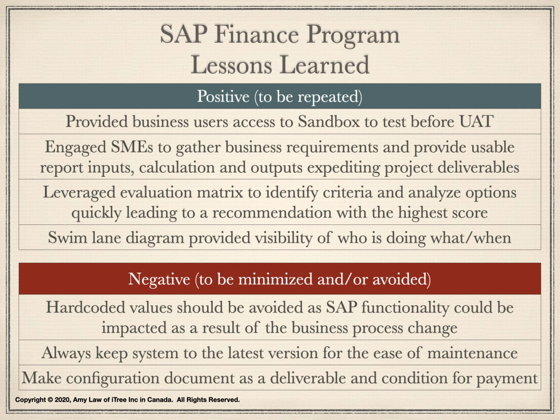Always update SAP system with the latest version for the ease of operation and maintenance. When a system was not patched for 7 years, some of the key functionalities were no longer working. Due to the urgent circumstances, the project schedule had to be condensed, affecting quality and limited options. So we should always keep system patches up to date.